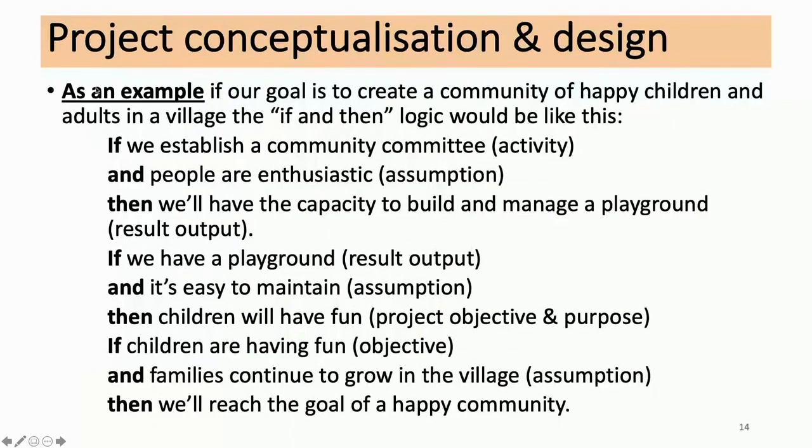As an example, if our goal is to create a community of happy children and adults in a village, then in developing a log frame we need to follow the if-and-then logic. If we establish a community committee, which is an activity, and the people are enthusiastic, which is an assumption, then we'll have the capacity to build and manage a playground, which is a result and output of the project.